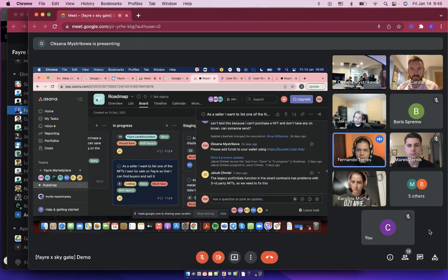If you need help on that point, you could ask Luis. He has experience with fixing that kind of issue on the smart contract. No, it's not a problem of fixing it. I'm just mentioning that it would be easier if we had the bugs as separate cards, so that we don't move the whole features to in progress just because of some issues. Because we always have issues regarding some modules in the application.